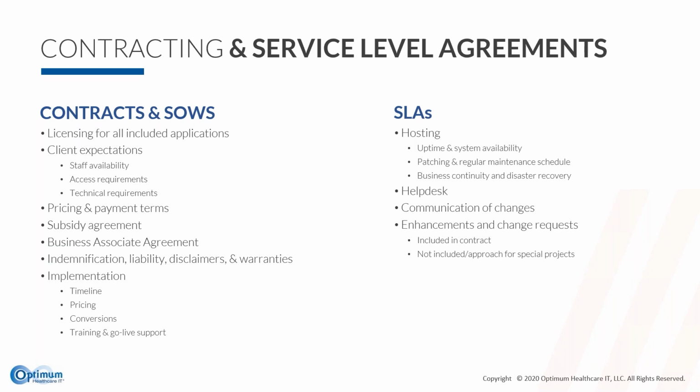As I said, the SLA often neglected, and I think this again gets back to some of the issues we saw in the class data at the beginning around communication and around missed expectations. So the SLA should be very transparent about what support will look like. It's some of the basic stuff around what's our uptime, do we have 24/7 support, and what does that look like? What's our escalation pathways? Those kinds of things. I think you also want to cover what is considered standard service or not. So what things are you going to build for them regardless, and then what is the process for that? If things are not in scope as kind of standard support, what is the process for those as well?